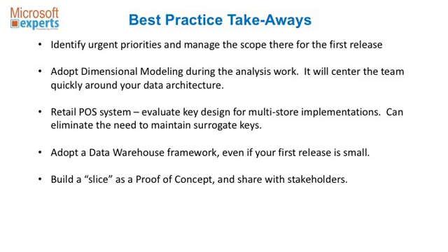And the other best practice, for getting support from your stakeholders and creating momentum and excitement in the team, is to build a slice, and we call it a proof of concept, through the first project. We did it even on a smaller scale than the first release.